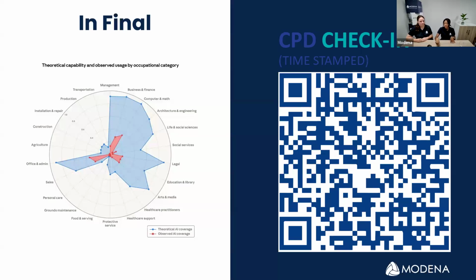And then only then, when you get insight from that, can you determine the number of people that need to be put. Because if I have a 13th floor building, but I'm just redesigning the windows for that renovation, exactly, I'm not going to need a full team of people. I'm going to need someone who's going to manage the renovations, removal, the cost of the removal, the cost of what we're going to do with the windows that we've removed, and also the cost for the new windows and labor for that. So it's quite different from the scale of a whole entire project.